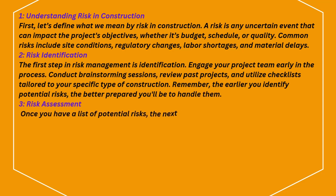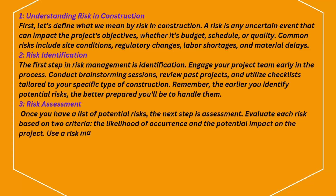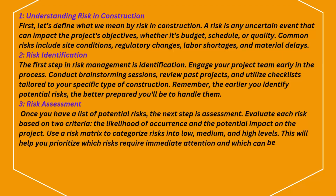Risk assessment. Once you have a list of potential risks, the next step is assessment. Evaluate each risk based on two criteria: the likelihood of occurrence and the potential impact on the project. Use a risk matrix to categorize risks into low, medium, and high levels. This will help you prioritize which risks require immediate attention and which can be monitored over time.